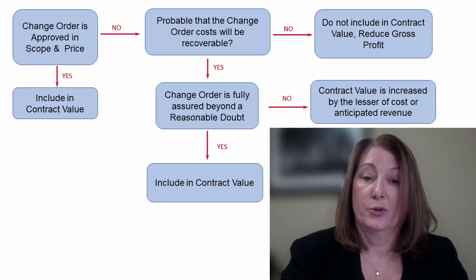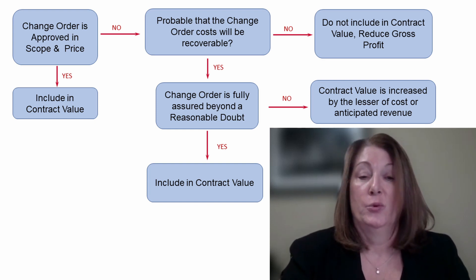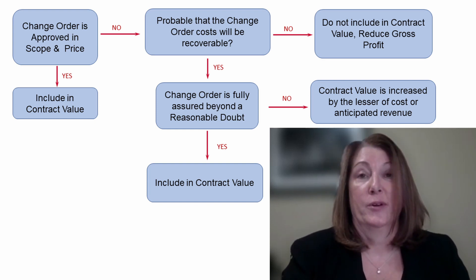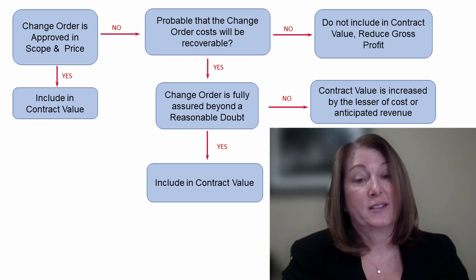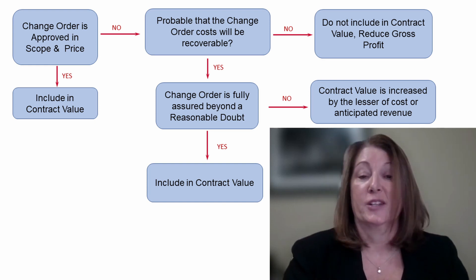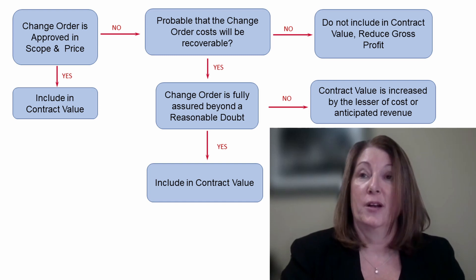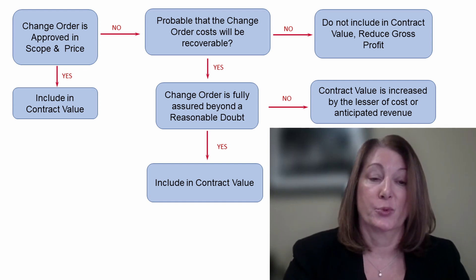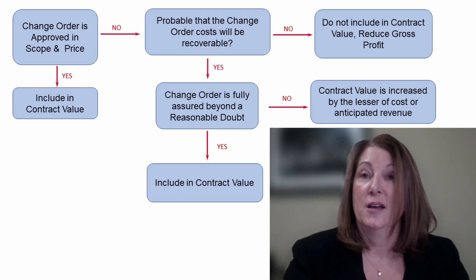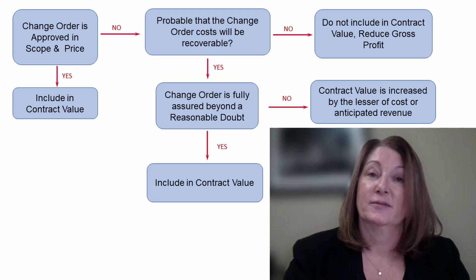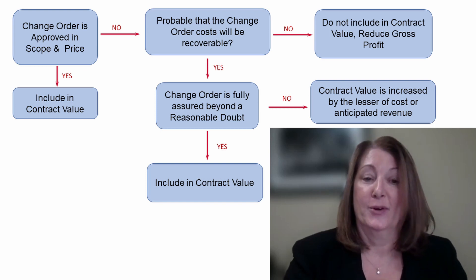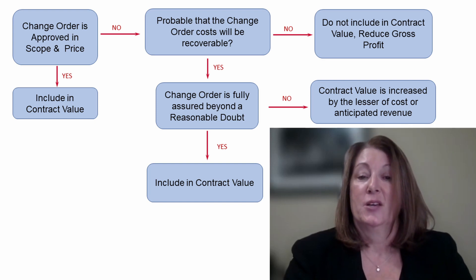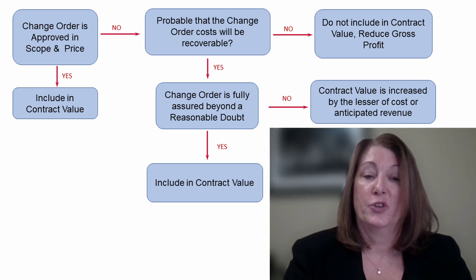If the change order has not been approved, you will need to determine whether recovery is probable. If after reviewing your facts and circumstances your answer is no, recovery is not probable and this is going to be a reduction in your gross profit. However, if it is probable, we have a little more work to do.